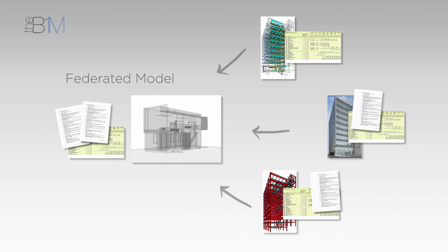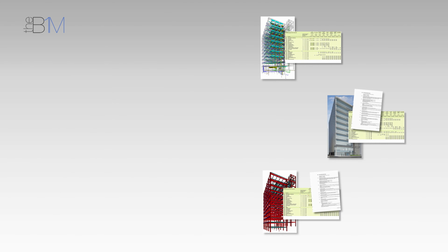At BIM level 2, this enables different members of the design team to work on their elements before overlaying them together to undertake clash detection and pick up issues with coordination before heading to site. It also gives all parties one clear source of structured information, rather than lots of different pieces from many different people. And that's it. Federating is just the process of bringing two or more models together, bringing things together. You might have to federate with your friends at the weekend, for example.